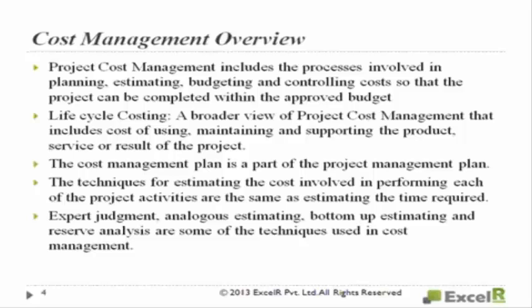Sometimes the initial capital expenditure may be more. Say you developed a different product, and its initial capital expenditure is $100,000. Every month, only $50 is required for maintenance. Over a 10-year span, 12 months into $50 is $600 for one year, and $600 into 10 years is $6,000.